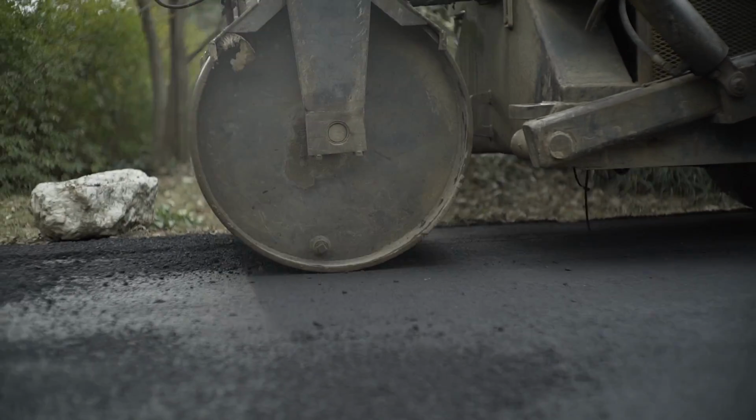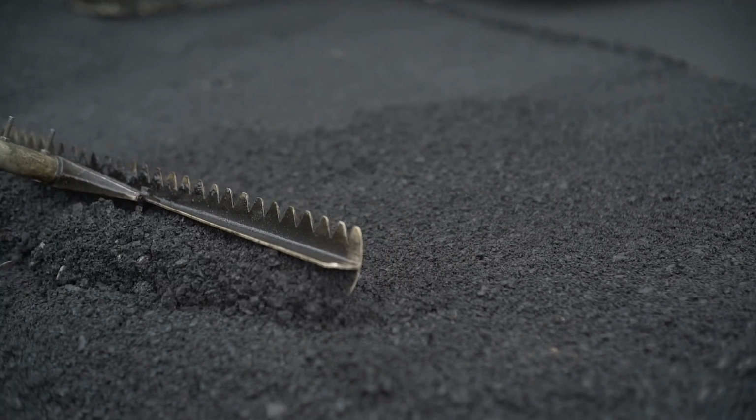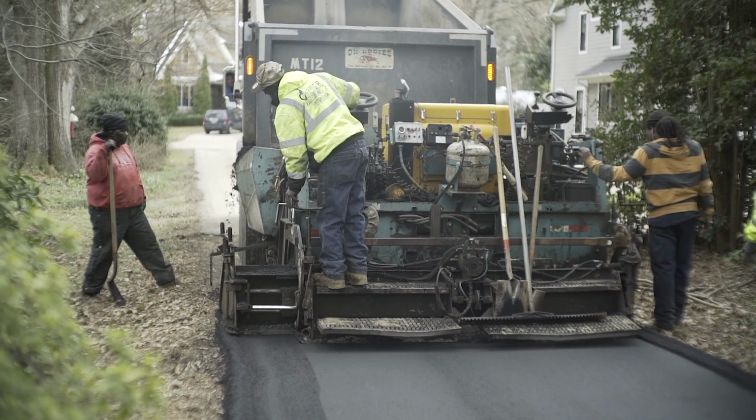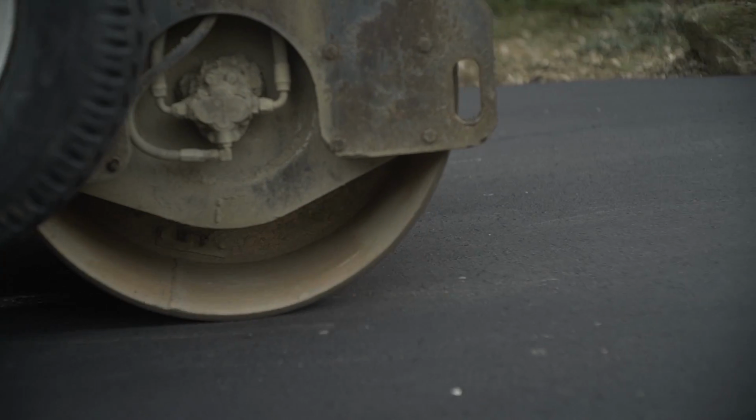Good news, bad news on Operation Replace the Road. Early on in our project, if you guys remember, the road was a question. It wasn't in great shape when we got here, but we didn't make it any better. So at the end of the day, we took the expense to replace the road. The good news is I thought I was gonna have the cost of a car in this, but it's only like half a car. So it was still pretty pricey, but not as bad as it could have been. So the guys are getting the road in today. Small window. Staging comes tomorrow. So they got in here, got it done, and I'm happy that we put it in, made the road better than it was when we got here.